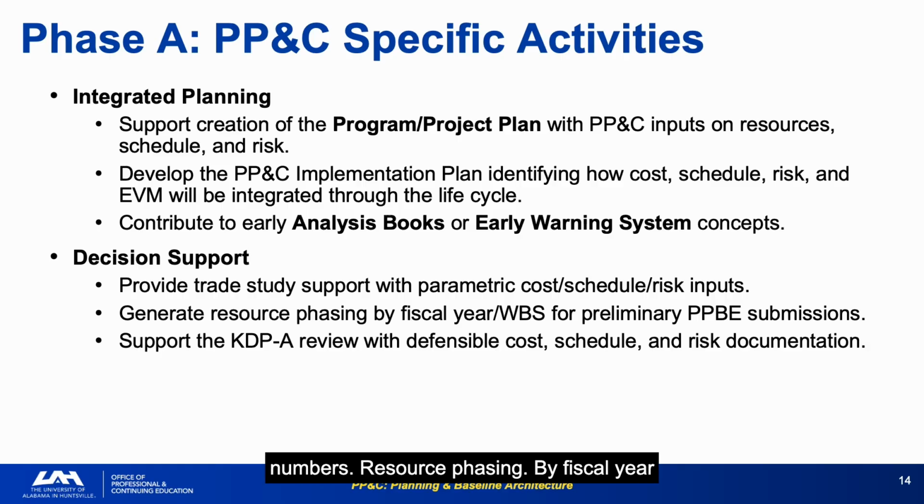Resource phasing by fiscal year is an output of Phase A PP&C work, and that phasing feeds directly into the PPB submissions that will determine whether the program receives the funding it needs in year 1.